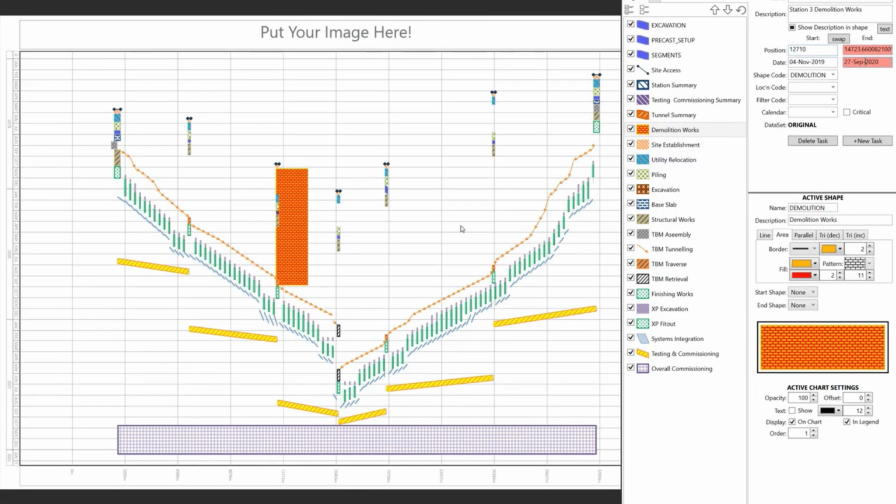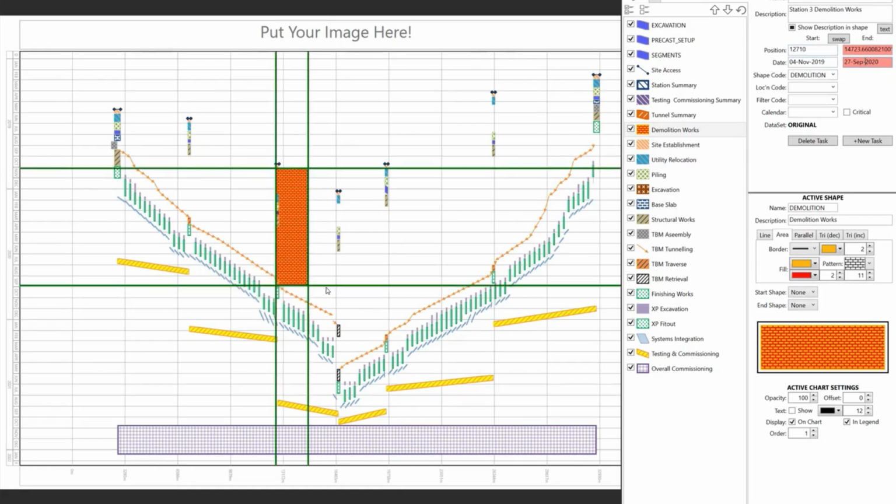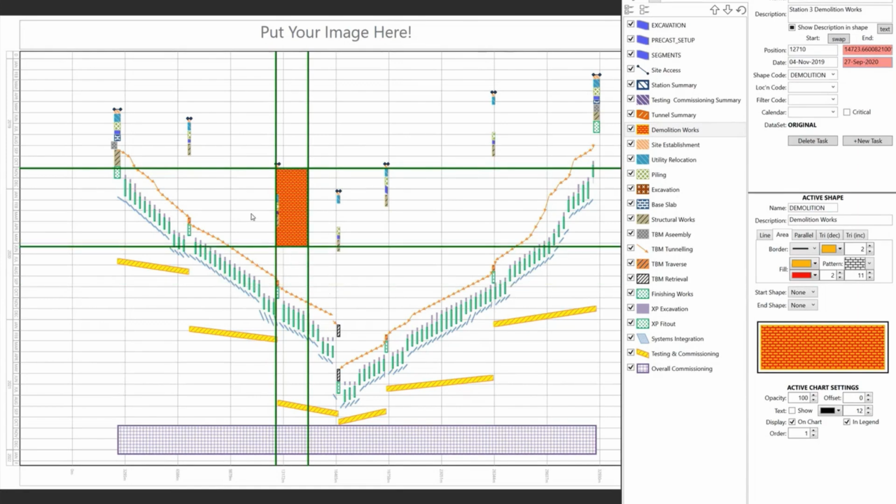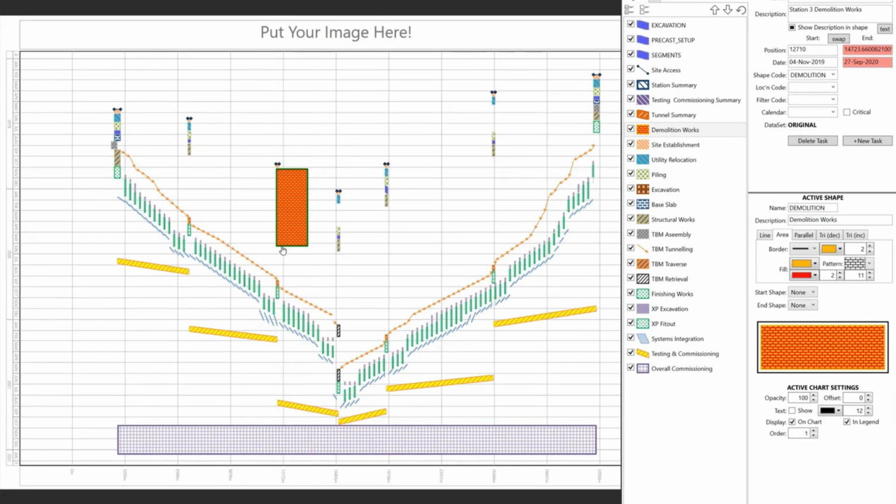And the reason we've done this is it's by design, because the moment you start saying, we want you to reschedule based on this, it's not just about the traditional finish to start type of relationships. You also need to take into consideration the physical space. So I now have to say, well, as the dates for the activities change, I need to consider how that relates to activities that are within the same area, and that information is not contained in the CPM logic.